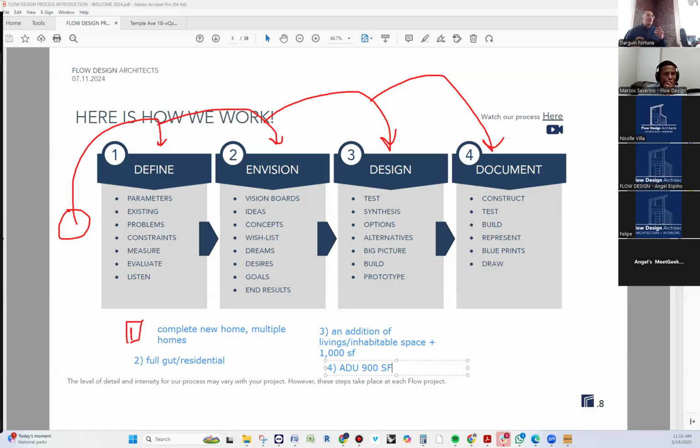Now, keep in mind, as a designer, it is really the responsibility of the owner to acquire those services. It's not our responsibility to acquire those services. We submit it and provide it as a service to have more control over the process, but it is not something that we're supposed to do. Just like the survey is supposed to come from the client, technically all surveys and civil engineering services should generally come from the client. Civil and survey are generally client-oriented services, but you need to be aware of these things